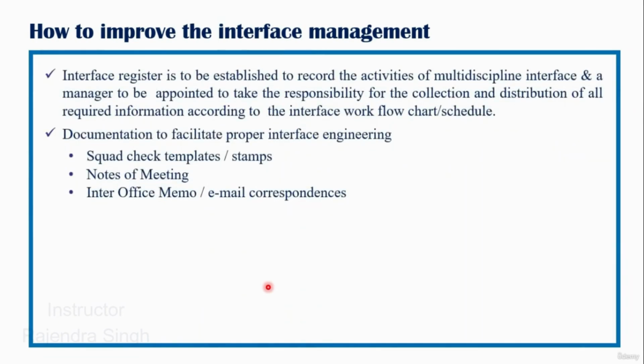Interface register to be established to record the activities of multidisciplinary interface, and a manager has to be appointed to take the responsibility for collection and distribution of all required information according to the interface workflow chart schedule.